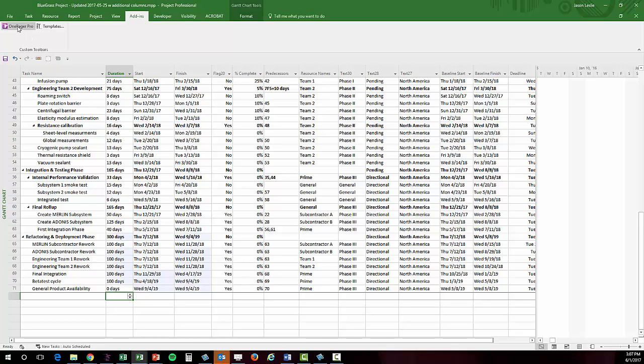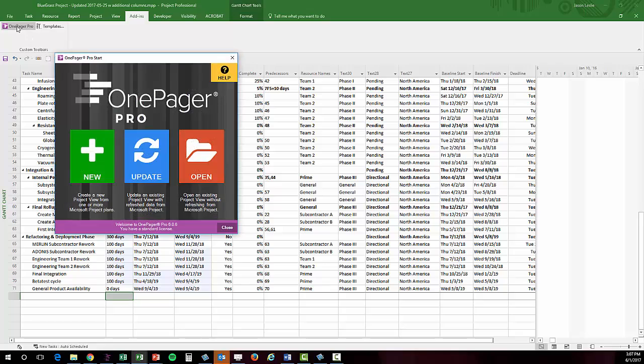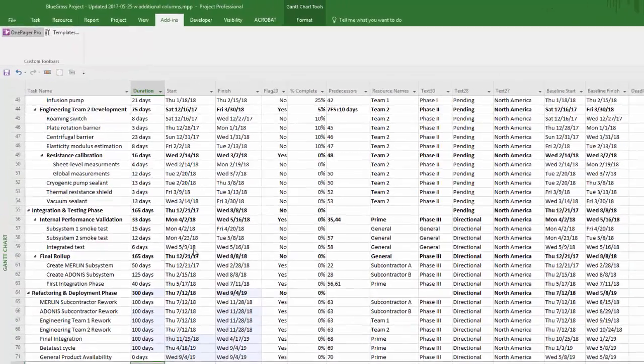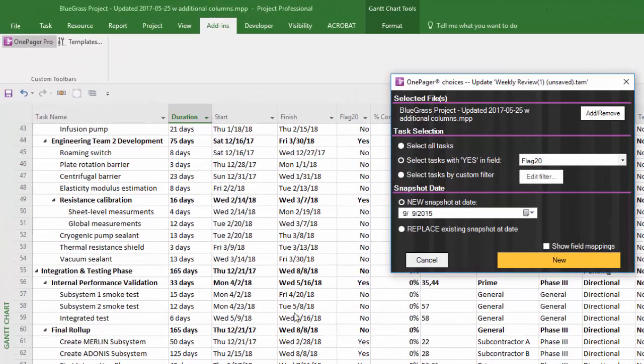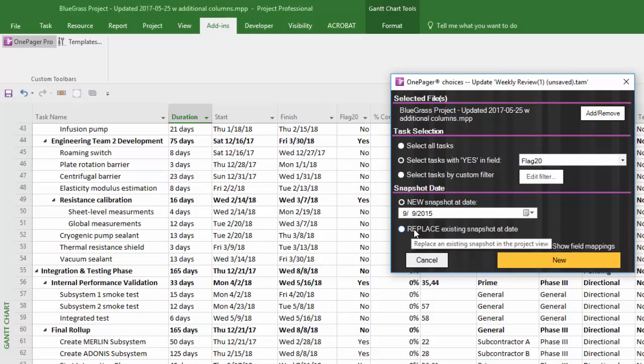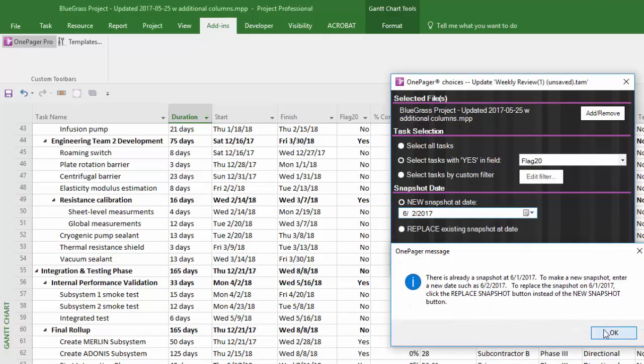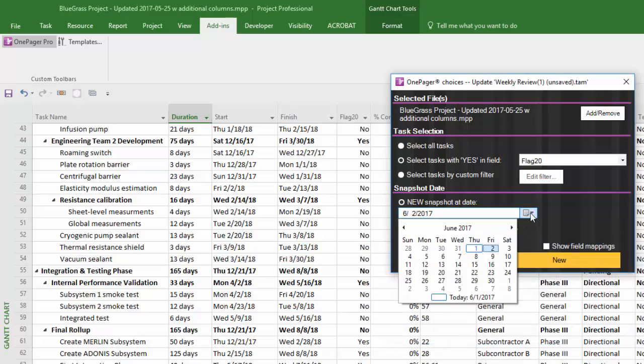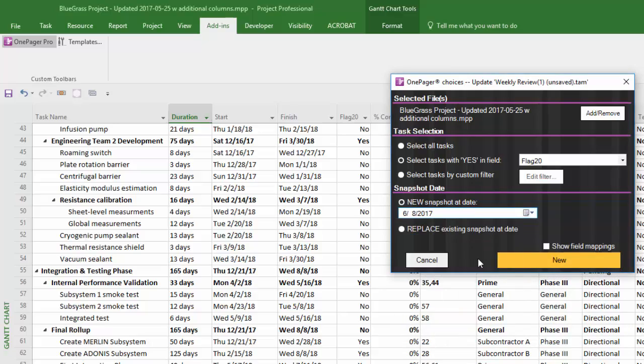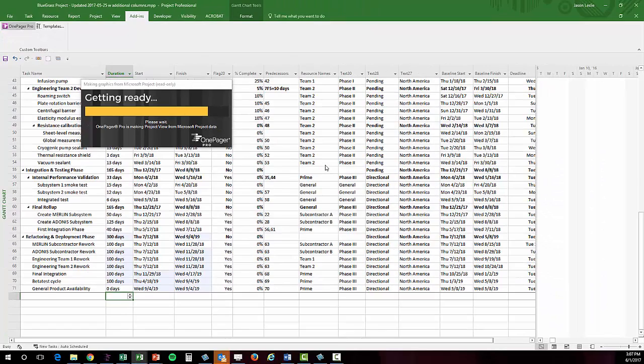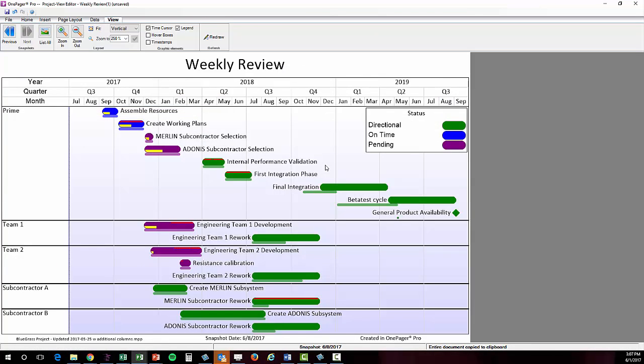Now that it's a week later, I need to walk into my weekly meeting with an updated visual. First, I'm going to click my OnePager button. Then I'm going to click Update. Here I can select to make a new snapshot or replace the snapshot I have. We're going to make a new snapshot and we're going to select a date of a week past our previous snapshot. Then click New. OnePager is going to pull in a fresh set of data from MS Project and present me with a new snapshot.